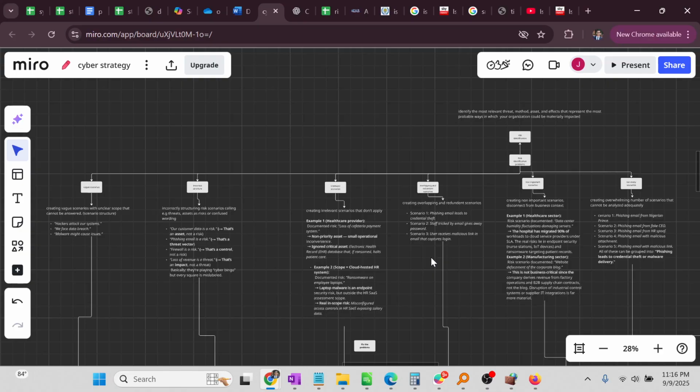If you are a student aware of risk management, you know that risk identification comes first. After this process, you have risk analysis, where you are trying to establish the level of risk. And there is risk evaluation, then there is risk treatment. And these processes, risk analysis and risk treatment, are very resource intensive.